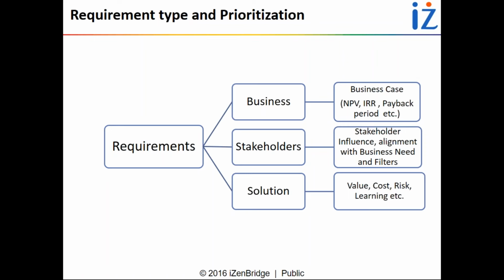Here you can see that for a particular stakeholder requirement, you may have different approaches to implement that particular stakeholder requirement. And here value may not be related to money. You may say, okay, this alternative has 2 points, this approach has 8 points, on the basis of how efficiently this option will be aligned with your stakeholder requirement, and stakeholder requirement is aligned with your business requirements.